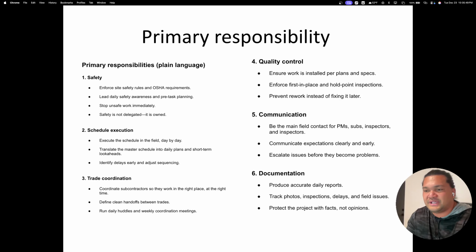Perfect. Allow a couple of days, because sometimes the inspector's going to call it, hey, you got to get this, you got to get that. Then you call those guys back and be like, hey, we need this done. I got the reinspection in 3 days. So it'll give you enough time to get it done, or 2 days, whatever those days may be. You need to just communicate that. And then you need to make sure, like, hey, you call the drywall guy, hey, we're going to be ready for you.